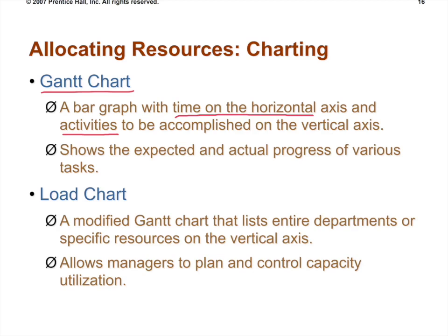How about the load chart? The load chart is a modified Gantt chart that lists the entire department or specific resources on the vertical axis. The horizontal is the same as in the Gantt chart, that is the time.